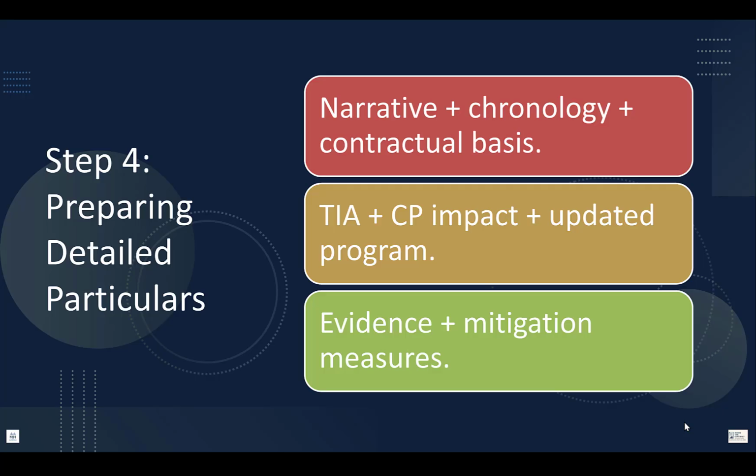The deadline is within 84 days from awareness, not from the date you submitted your notice, unless, of course, the engineer extends it. Under 20.2.4, if the required statement, including the contractual and legal basis component, is not submitted within the time limit, the notice of claim may be treated as having lapsed, subject to the clause notice and review mechanics.